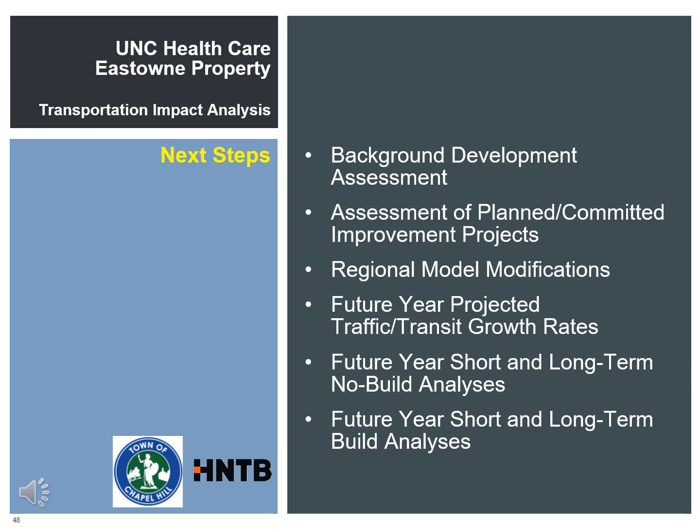We will develop future growth rates for both traffic and transit to assess impacts, and then we will look at both what we would call no-build analyses without improvements and development at the Eastowne site, and then a build analysis that would include these improvements, whether they be building, parking deck, access, new roadways, those sorts of things. And so again, these will be done for both a shorter term and a longer term to assess the likelihood of immediate impacts over the next several years, but then the long-term impacts over a longer time horizon.